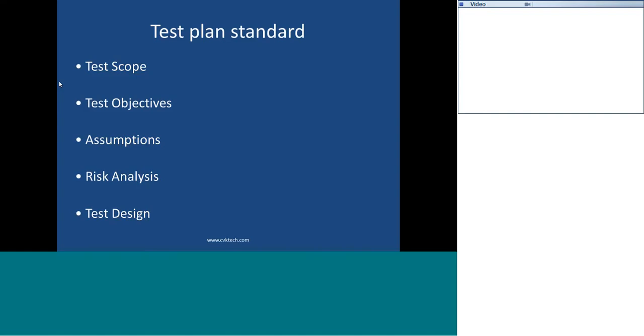So all these backup plans and plan Bs, everything will be covered as part of risk analysis. And there can be risks, our office may be closed due to some natural calamity, and that day there won't be any productivity. So what is the backup plan for such things? Even these kinds of risks will be included as part of the risk analysis section.